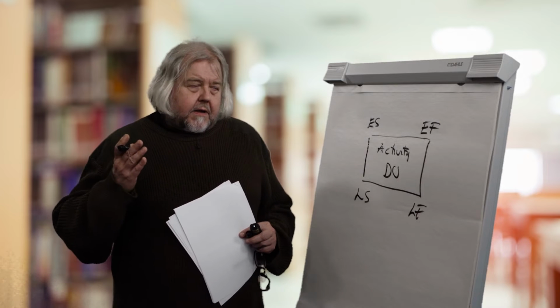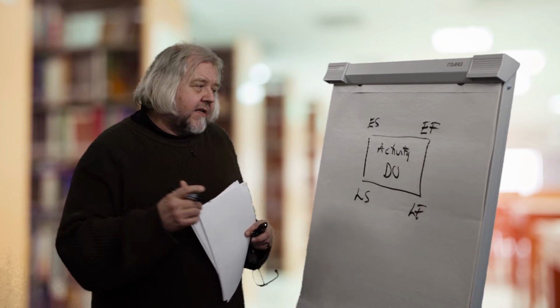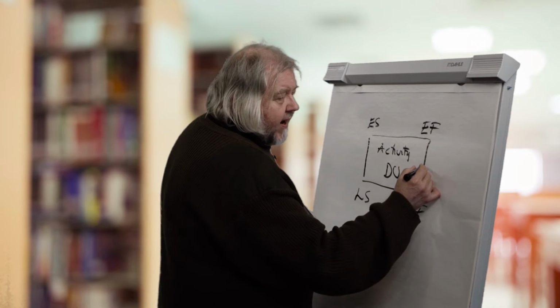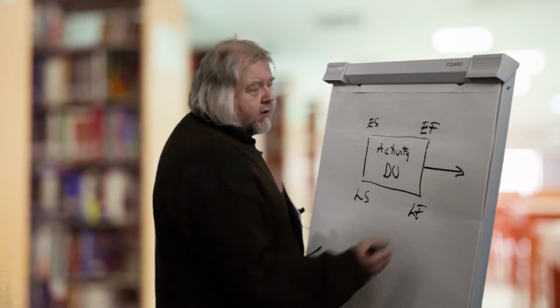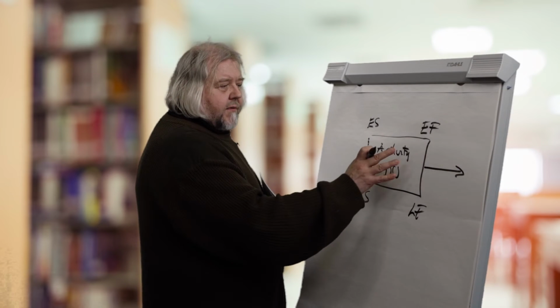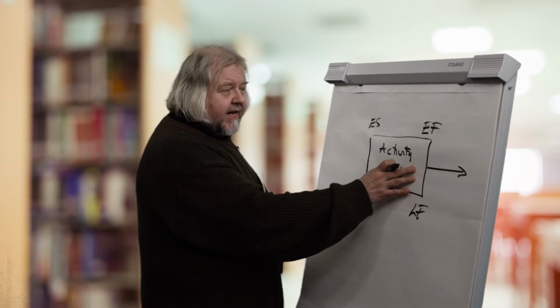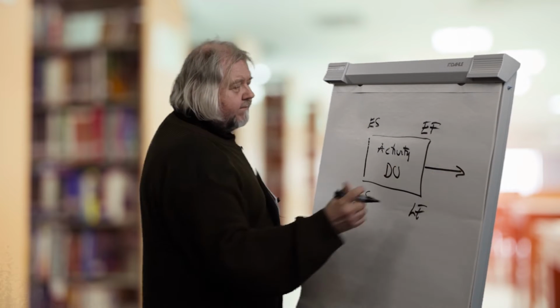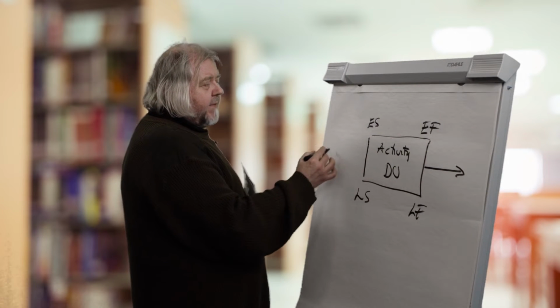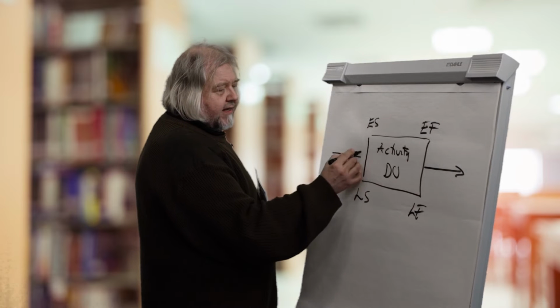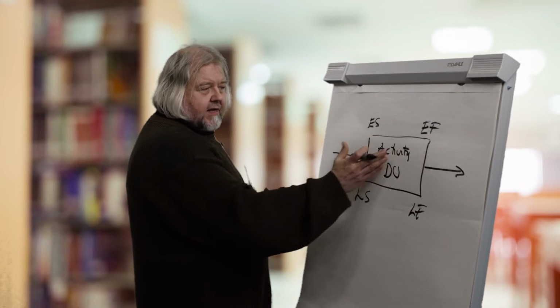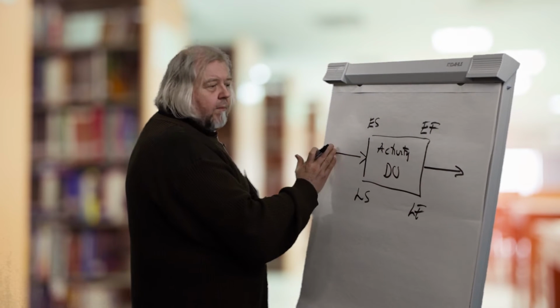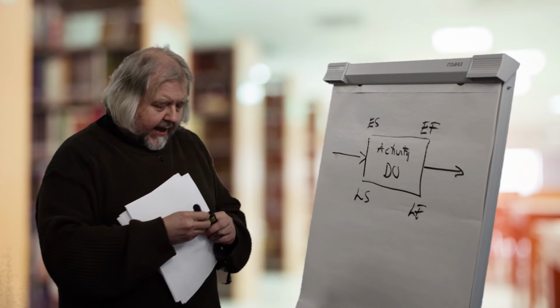And we mark also the dependencies between the activities with arrows. So this activity can be a predecessor of the successor activity. And of course, there can be other predecessors that precede this activity, which must be completed before this activity can start.